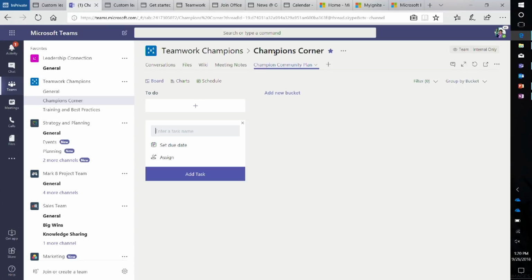Those are the bigger organizational portfolio and project management tools. Now, I'll tell you, one of the things that I do is I take some of the milestones from my planner and I put it in that bigger tool. I don't have to track every action of my team.